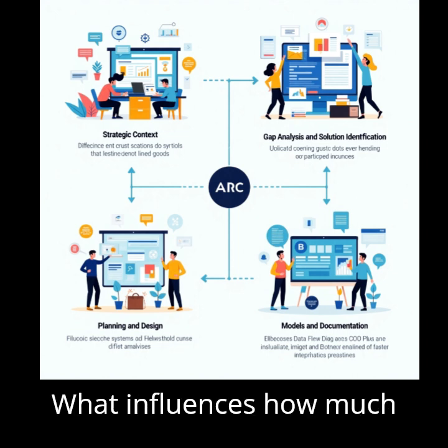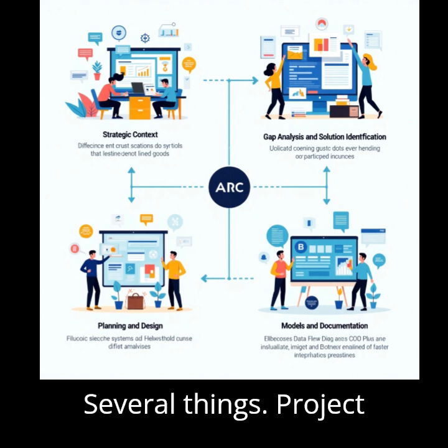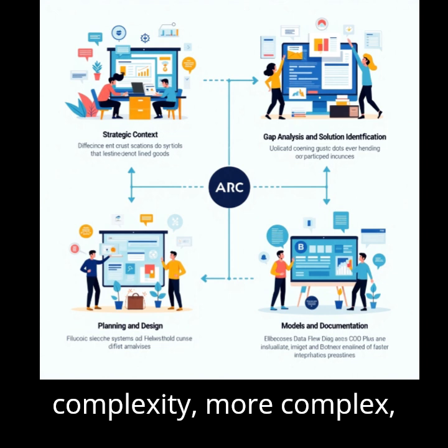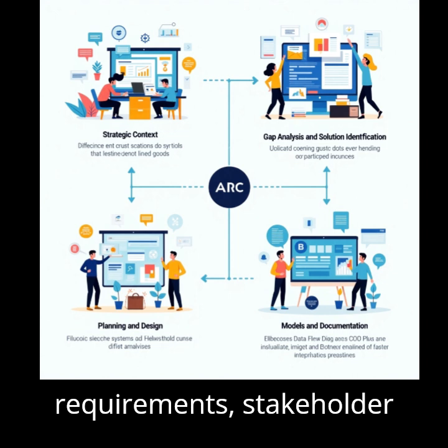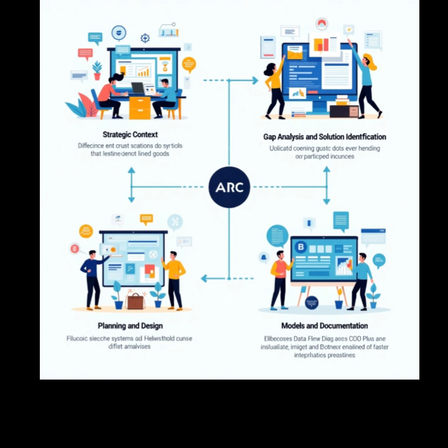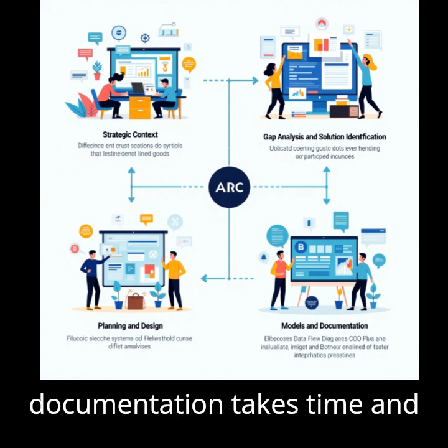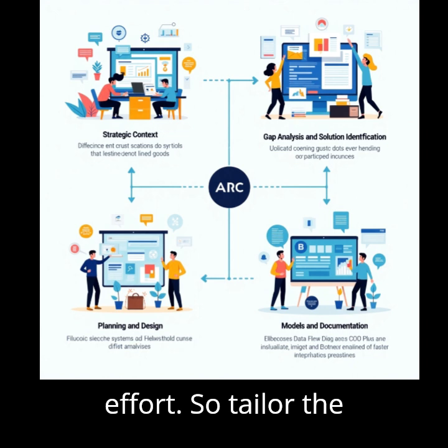What influences how much documentation you need? Several things. Project complexity, more complex, needs more docs. Team size and expertise, any regulatory requirements, stakeholder needs, what do they expect, and resource availability. Documentation takes time and effort. So tailor the documentation effort.